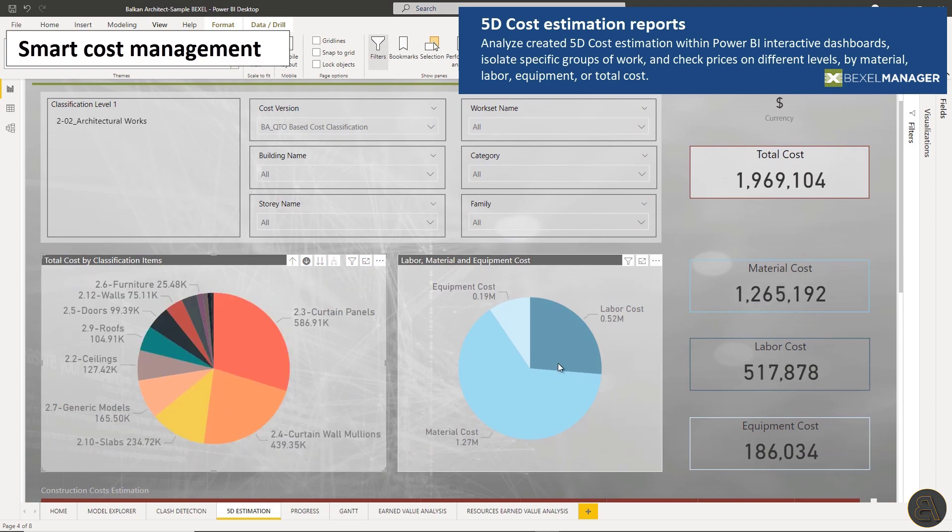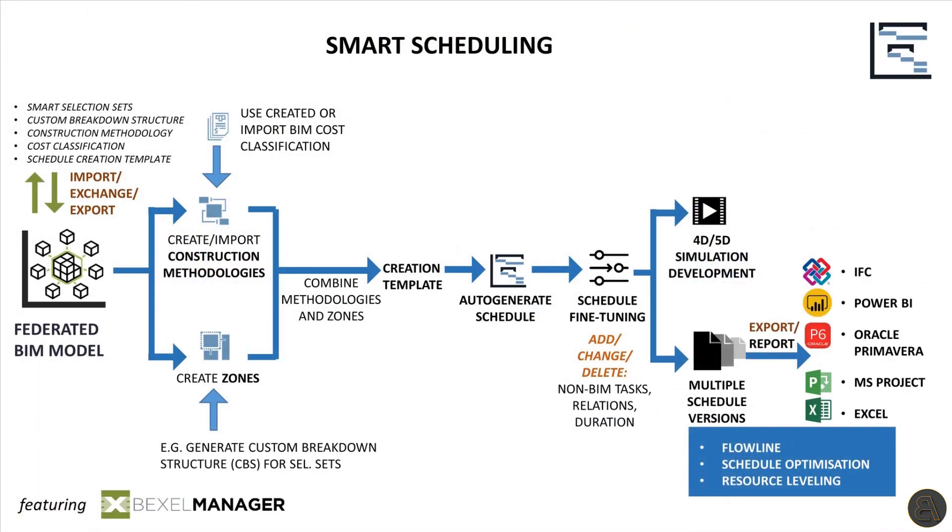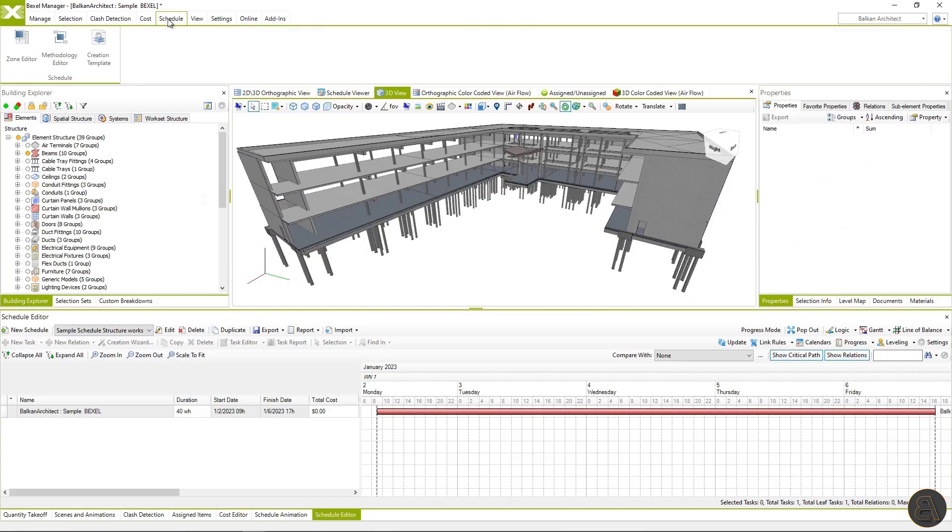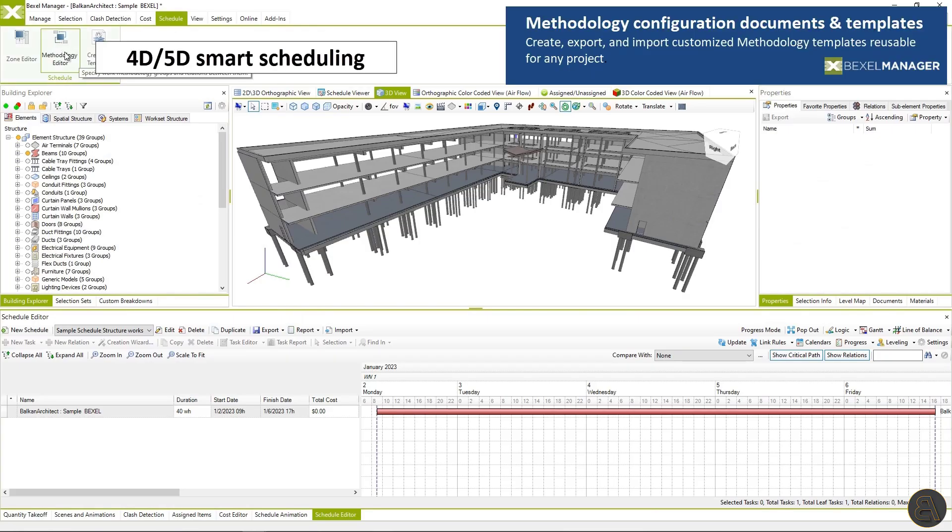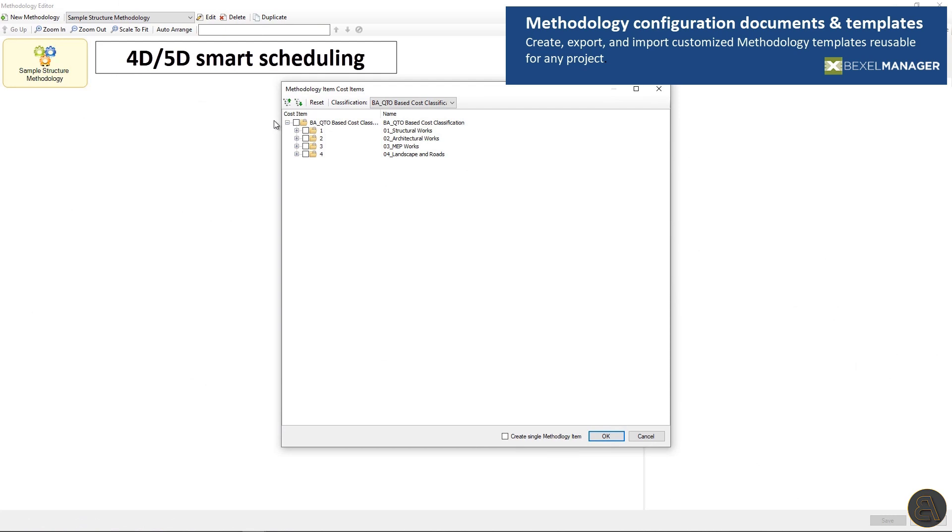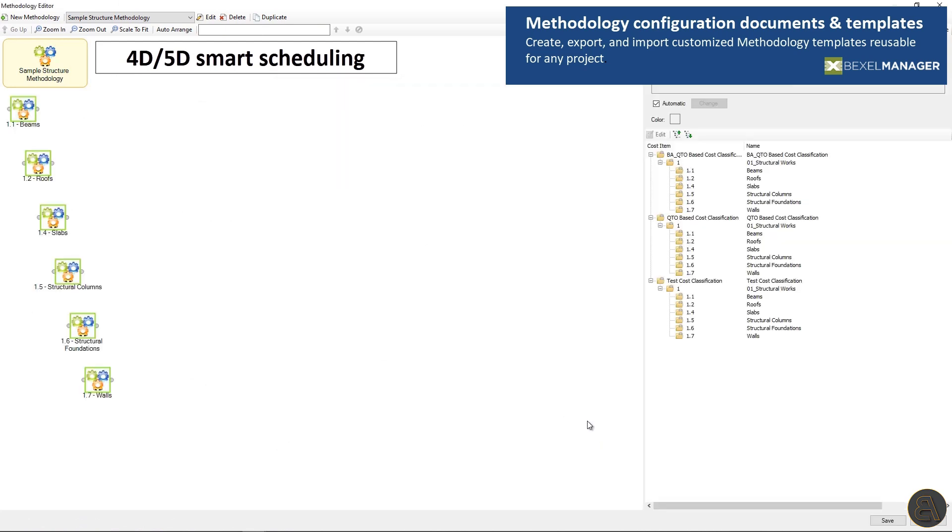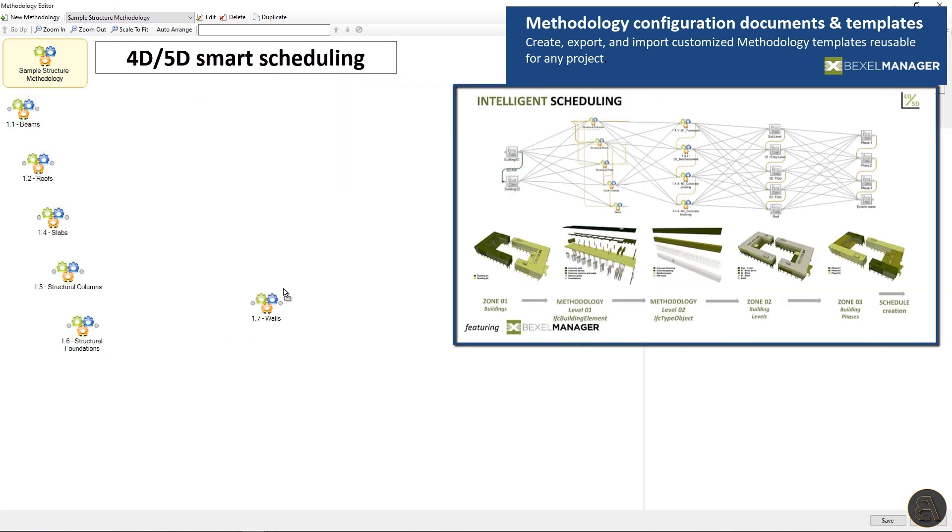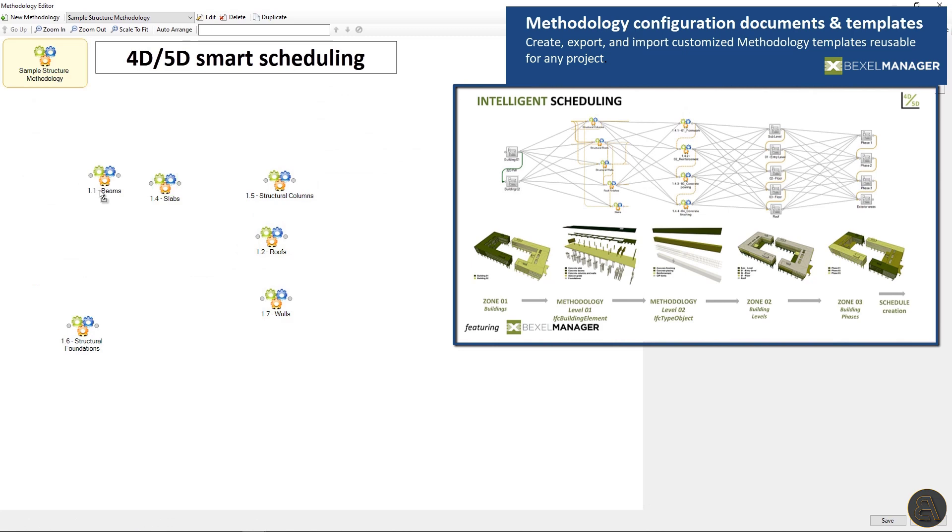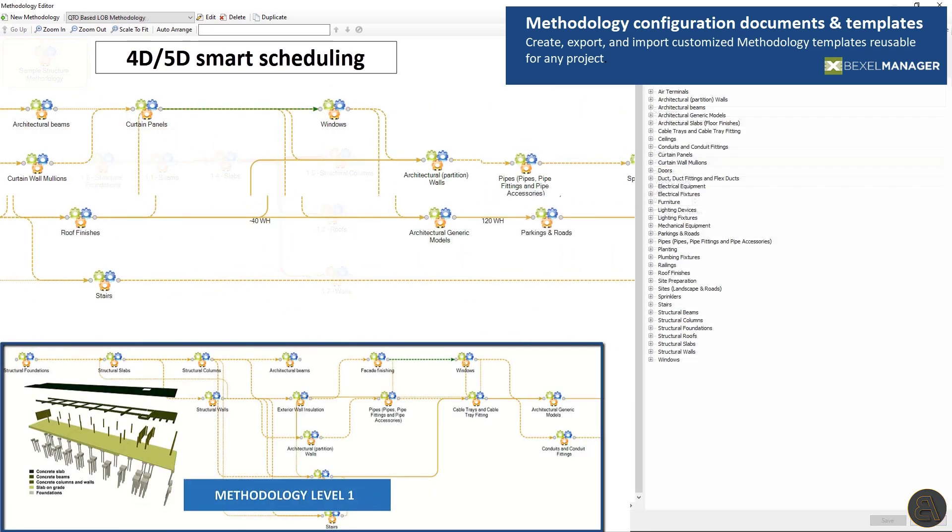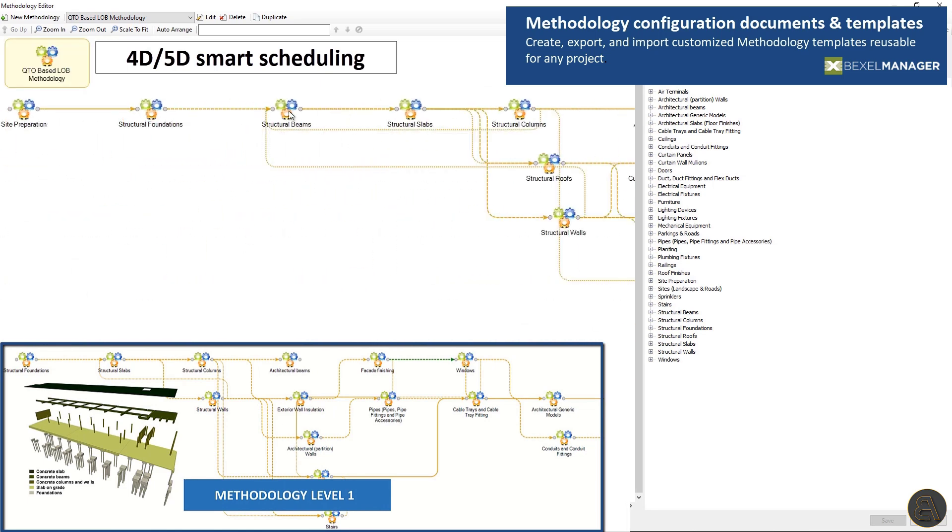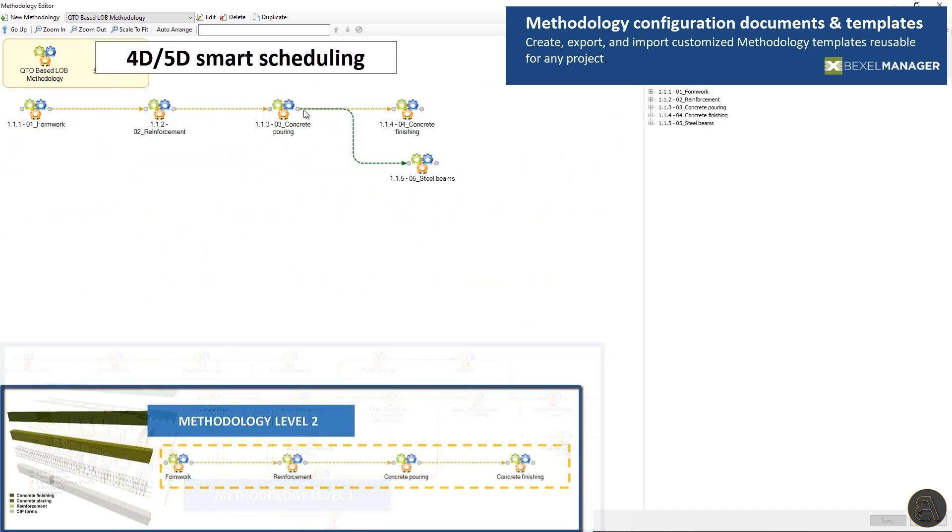Smart 4D and 5D scheduling rely on zones and construction methodologies, combining them and generating schedules with thousands of tasks and relations between them. Construction methodology is logic for work sequencing. Once created, can be saved as template and be reused on other projects.